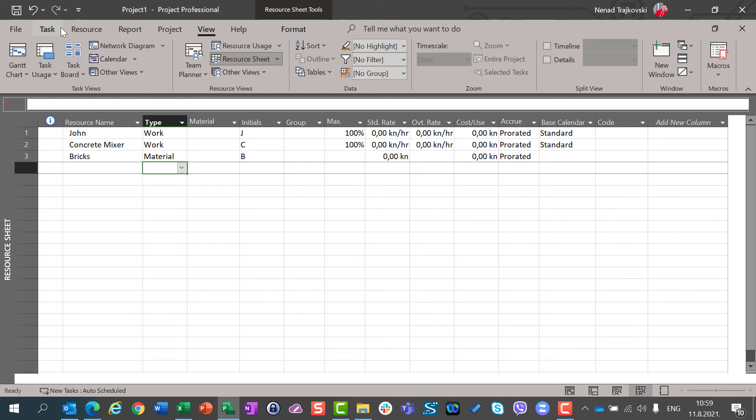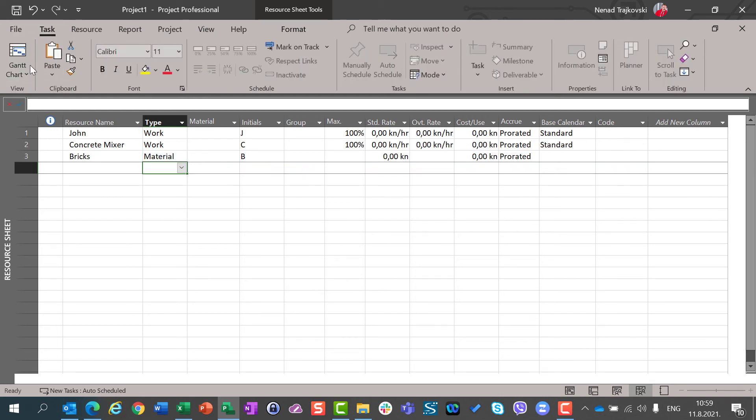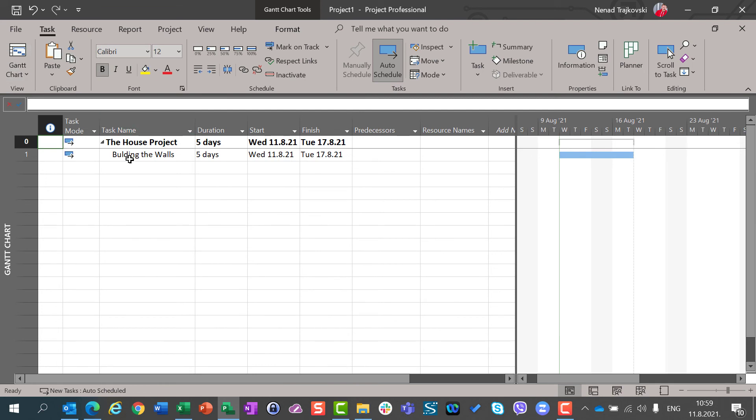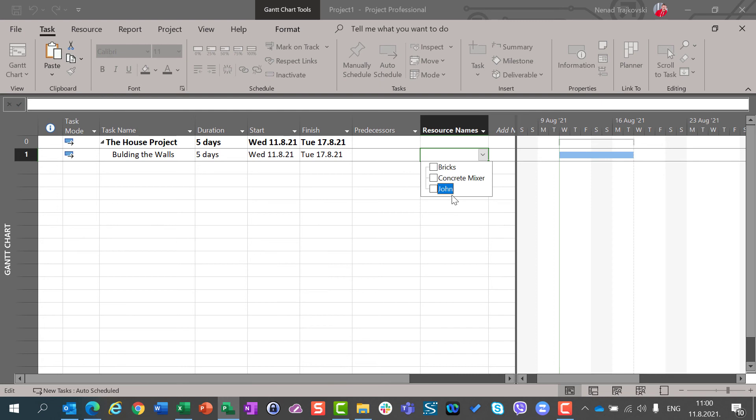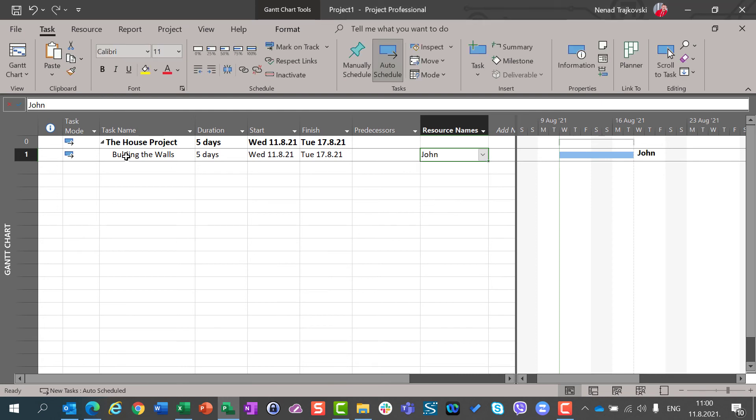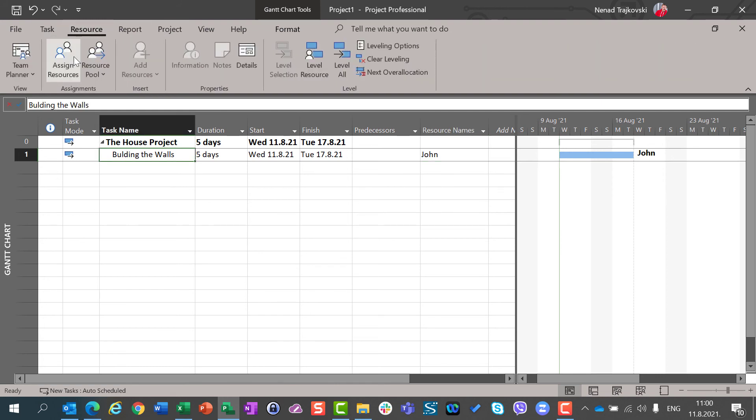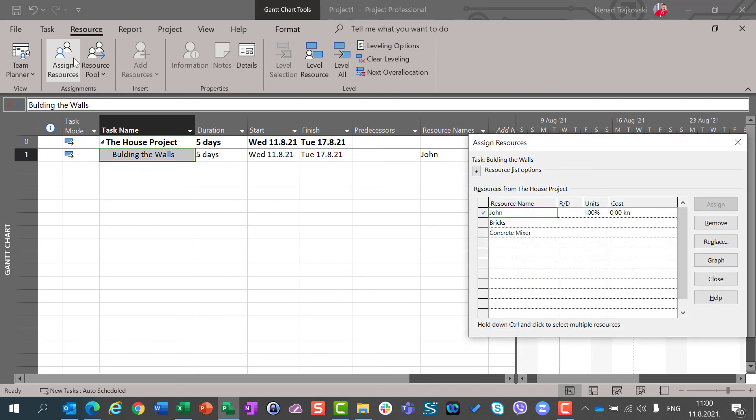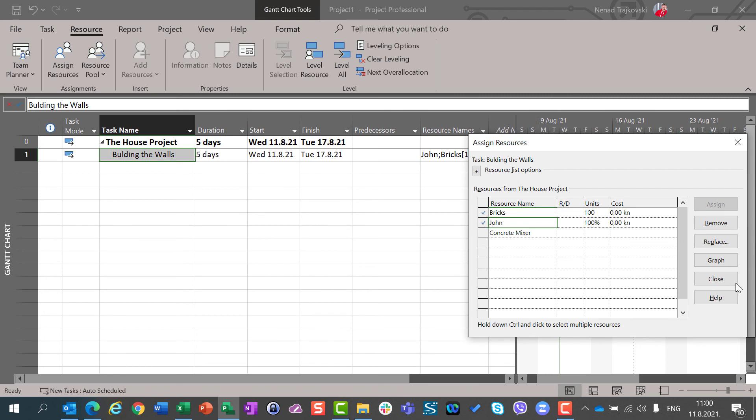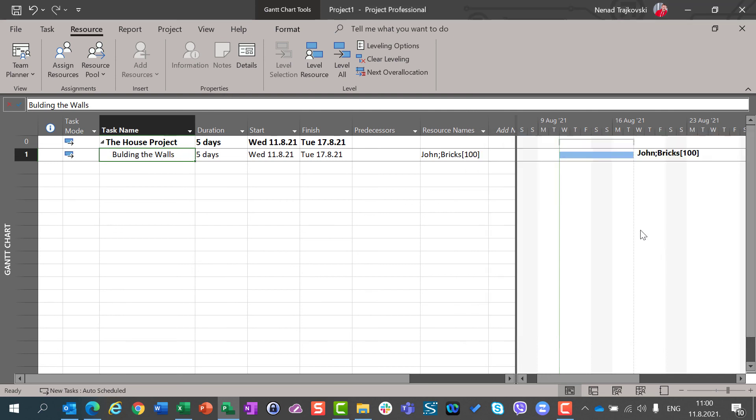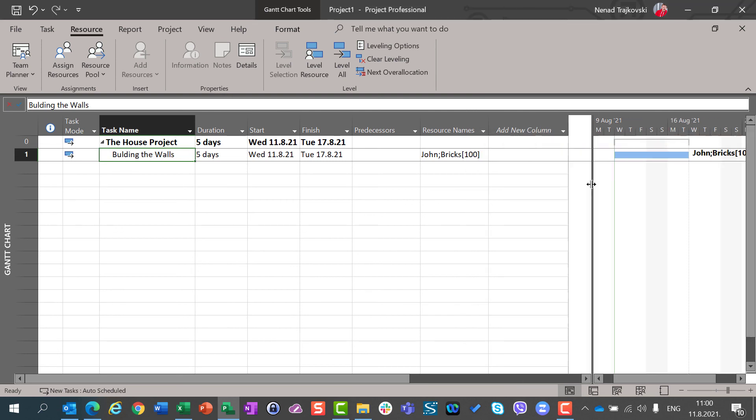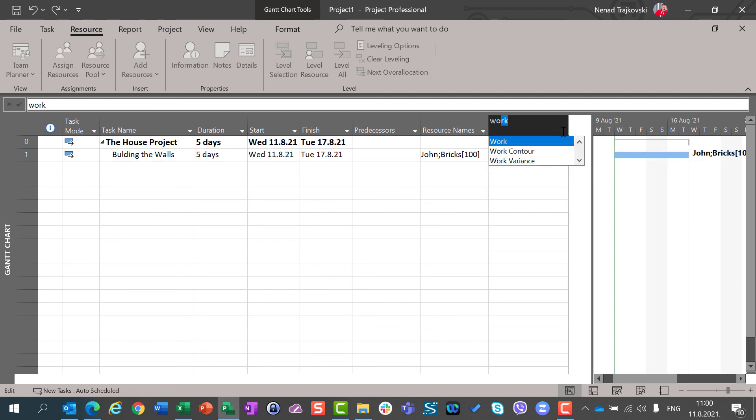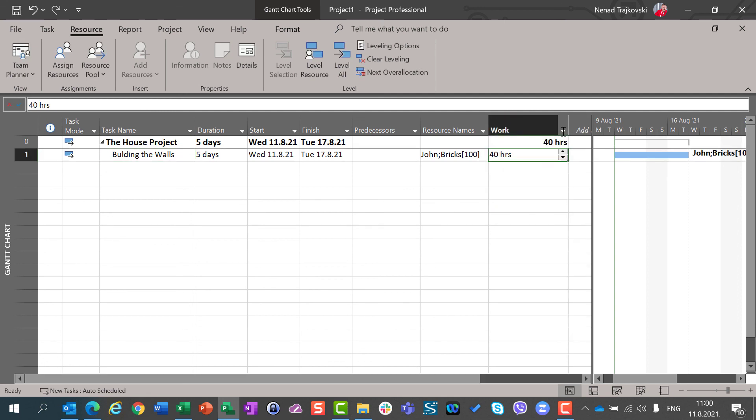And I can go to my tasks, to my Gantt chart. And now, by building the walls, I can assign John. But I can also assign, for this task, resource, assign resources. And I can say, I need 100 bricks. Sorry, this is 100 bricks, yes. And that will not extend my effort. So, here, effort is calling work.